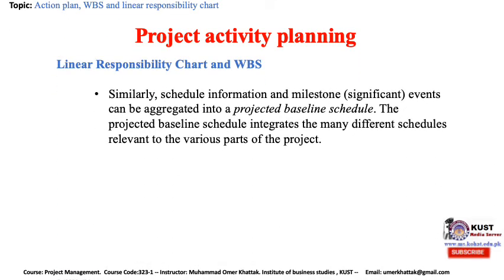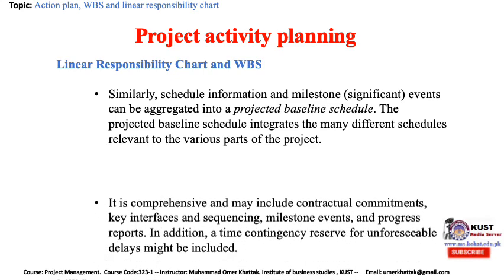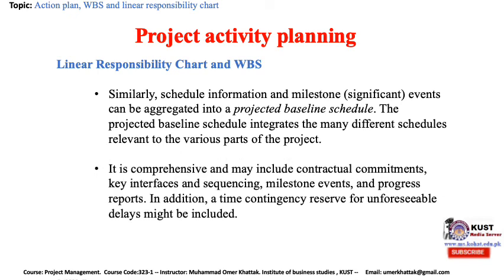Similarly, schedule information and milestone significant events can be aggregated into a project baseline schedule. The project baseline schedule integrates the many different schedules relevant to the various parts of the project. It is comprehensive and may include contractual commitments, key interfaces and sequences, milestone events, and progress reports. In addition, a time contingency reserve for unforeseeable delays might be included.